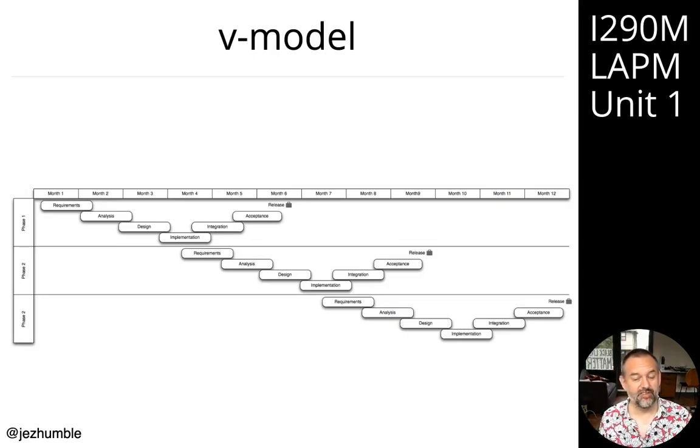So we're going to get some of the lessons we learned from implementing before or as we do the requirements gathering for version 2. But there's still a huge problem with this, which is that the lessons we learn after we release version 1 won't count towards the requirements of version 2. Instead, we have to wait until version 3 requirements gathering before we can incorporate the lessons we learned from the release of version 1. So that's hugely problematic.